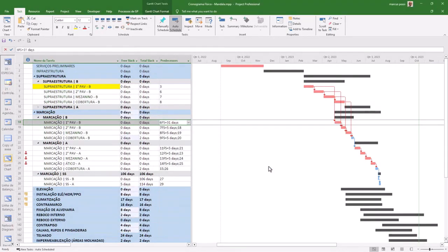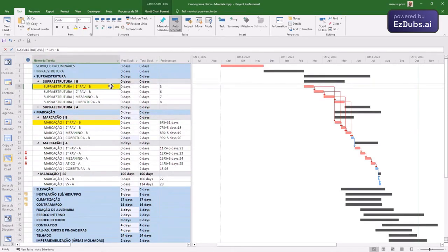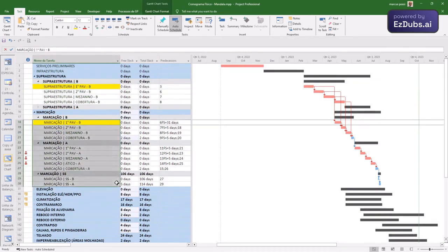What happened? I maintained the precedence logic, increased the delay, which means that if it changes at the beginning, the entire set will suffer along with it. If I hadn't done it by logical connection, if I had gotten stuck, they wouldn't reflect the consequences of the predecessors. But let's see if I solved it.